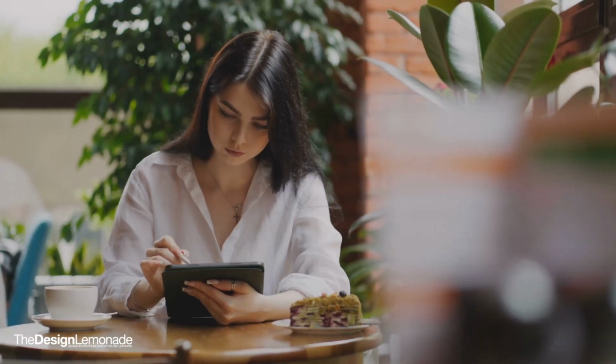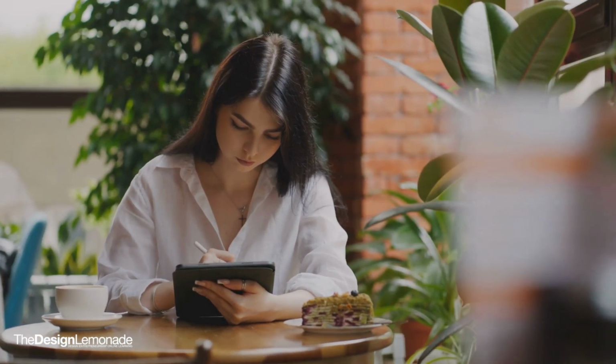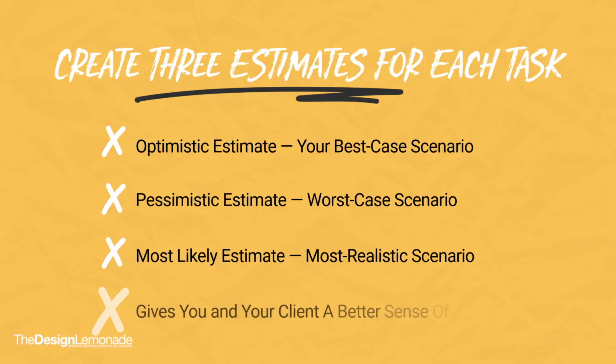Three-point estimating allows you to formally acknowledge and quantify that uncertainty. It provides a more realistic picture by creating a weighted average, which gives you and your client a much better sense of the potential cost range and associated risks involved in the project.